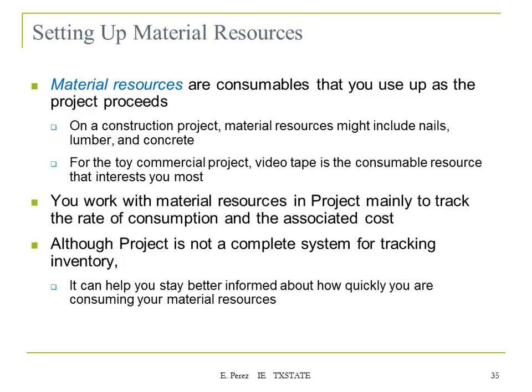In terms of material resources, these are consumables that you use up as the project proceeds. So on a construction project, for instance, material resources might include nails, lumber, and concrete. For the toy commercial project, videotape is the consumable resource that interests you most.